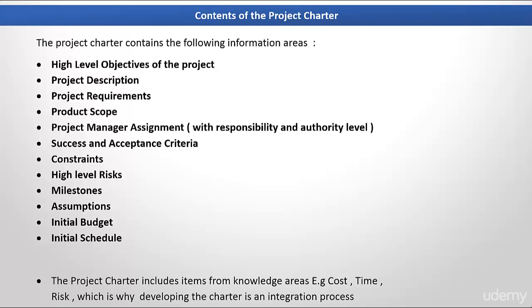Now, let's see what information does the project charter contain about the project. The project charter contains information regarding what are the high-level objectives, what is the project description, what are the project requirements, what is the product scope, who is the project manager to whom authority and responsibility has been assigned, what is the success and acceptance criteria of the project?